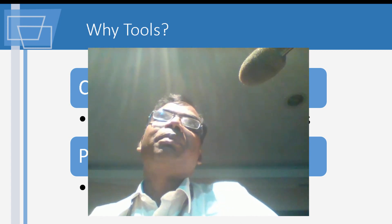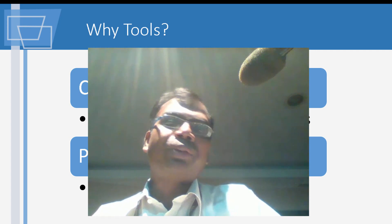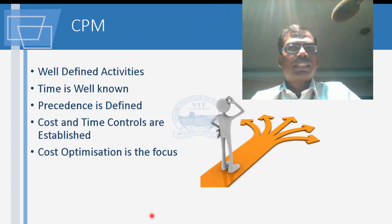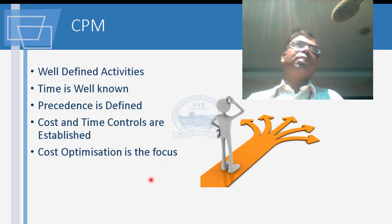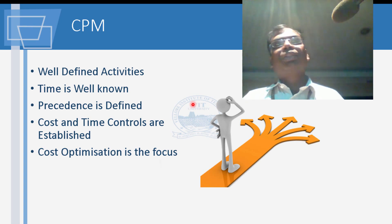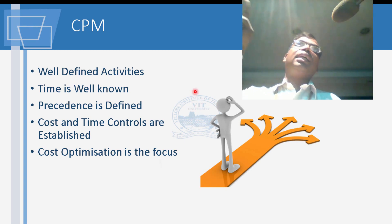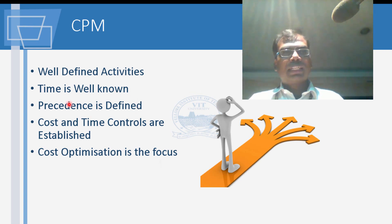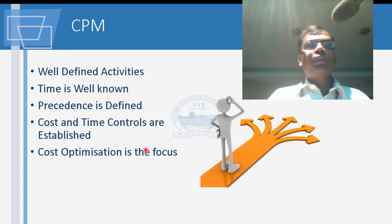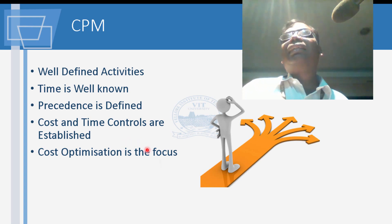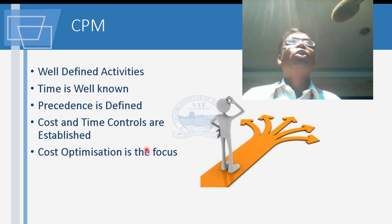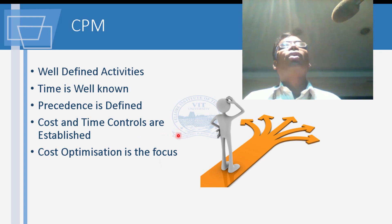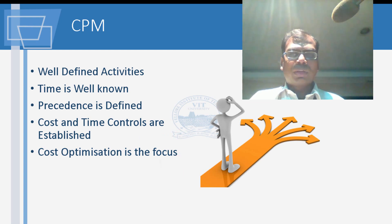CPM is good for repetitive projects, while PERT is for research-type or one-shot projects. In CPM, you define activities first, then duration, then precedence — what comes before or after. Controls or milestones are established, and cost optimization is a key focus of CPM.